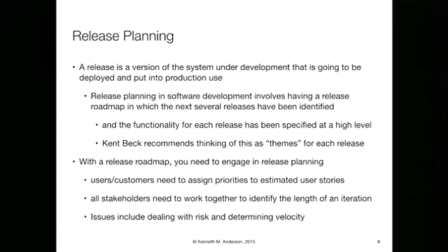And so now you go through iteration 1, and 10 points weren't completed. So now those have to go into iteration 2, right? And now we know that, oh, here we'd planned 30 points for every iteration, but now we have only 20 points. That's our velocity. So what are we going to do? What are the 20 points we're going to assign to that next iteration?